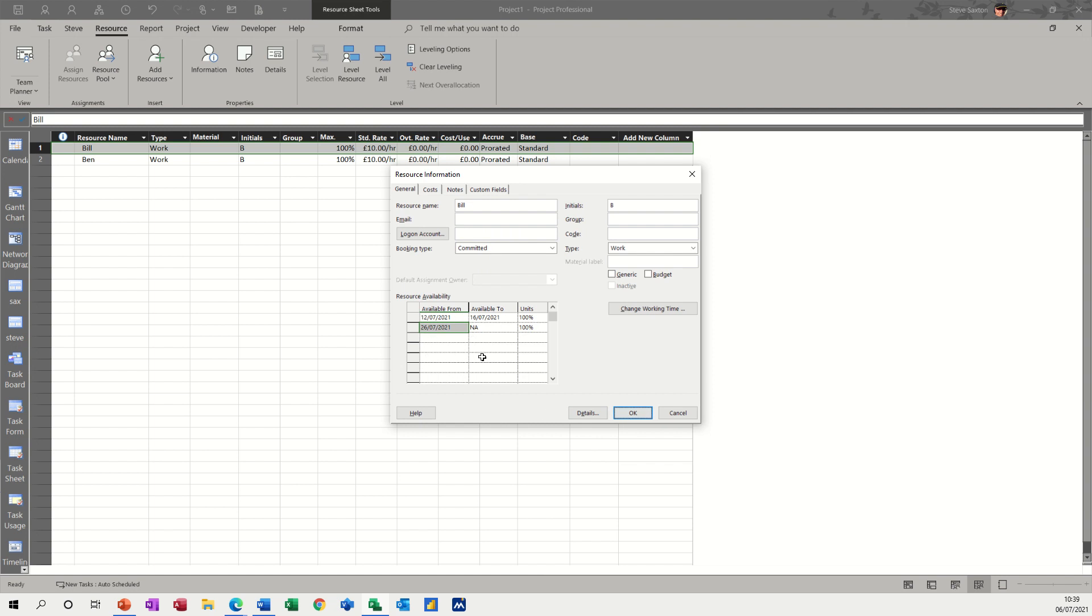And if you allocate them, as you saw, it will go red if you allocate them from this option. And it will change the date, or try to change the date, depending on links and things, if you've got him not available at all.